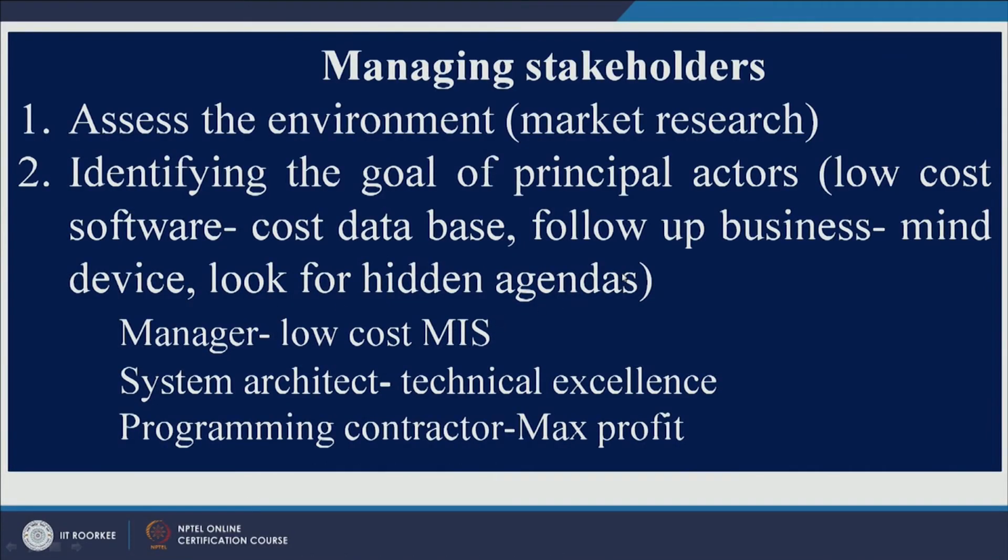I will give you another example. Let us say I am a manager of the IT department, and I am looking for low cost MIS software, management information software. Being a manager, I want low cost software, but the system architect, who is also a stakeholder in this project, will look after technical excellence. On the other hand, the programming contractor will try to maximize their profit. So, three stakeholders, different objectives. We need to identify stakeholders and what they want, right.